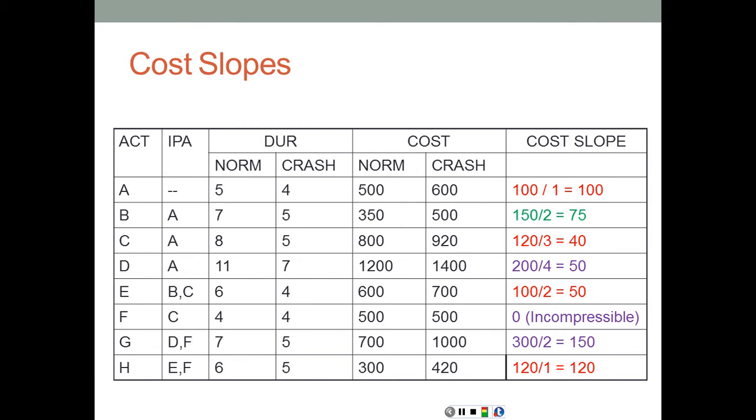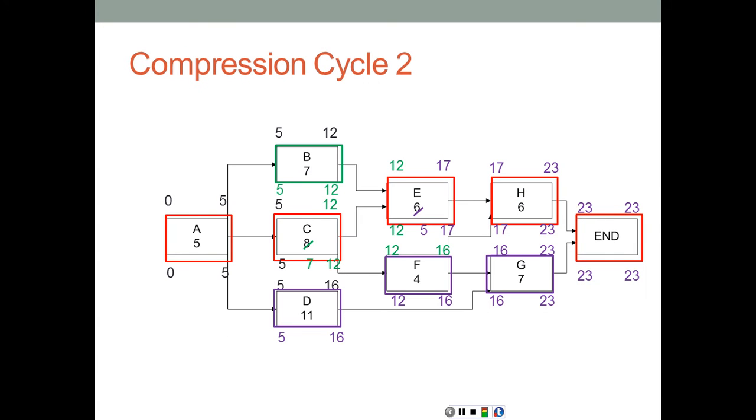Our next step, again, all the activities now are critical, so we need to look at which activities need to be compressed. In order to compress this network, again, the options are, I have to compress all the paths by the same amount. So it's either compressing, for example, H with G, or E with G, or B and C together with D and G, because D is on a separate path from G. So remember that we have 3 paths.